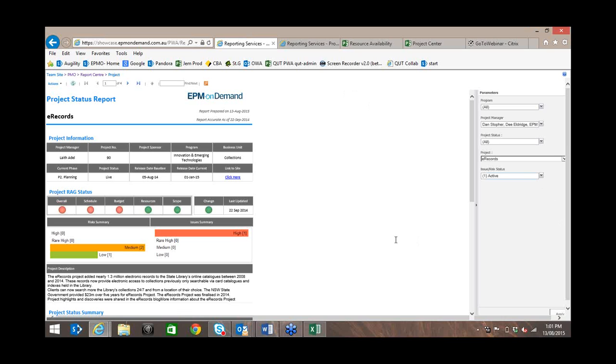So you do get SharePoint and Project Online as a cloud offering, but SSRS has to be either installed on premises, or you could host your self-hosted virtual machine and install SSRS over there yourself, or you could use a third-party SSRS hosting solution such as EPM On Demand or Project Host or Fluent Pro, etc. Once your SSRS gets hosted, Microsoft does offer a way to access your Project Online data via OData connector.